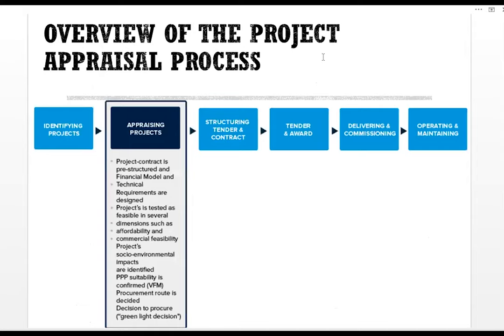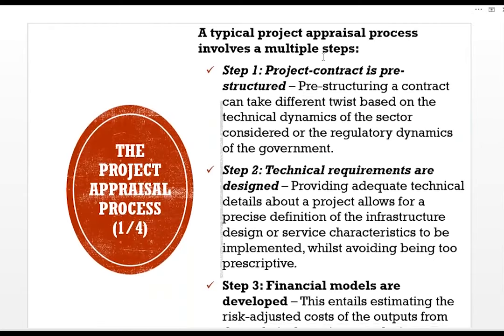Overview of the project appraisal process. The PPP project lifecycle includes: identifying projects, appraising projects, structuring tender and contract, tender and award, delivering and commissioning, and operating and maintaining. Under appraising projects, a typical project appraisal process involves multiple steps.